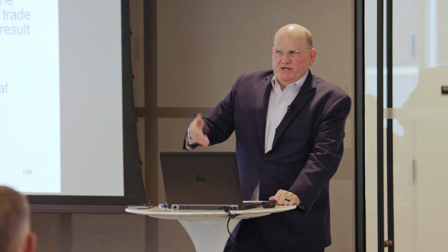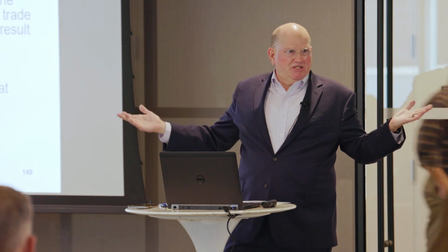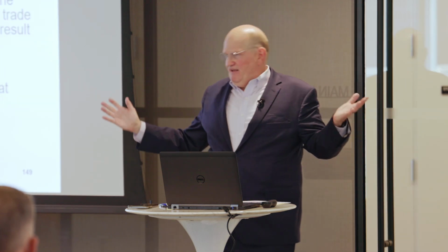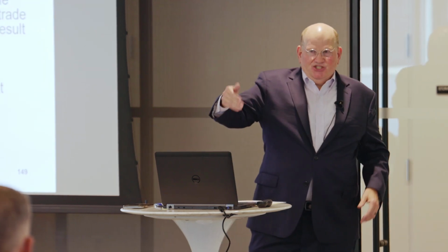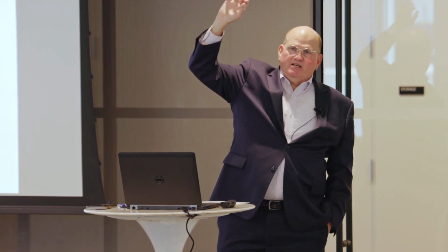And the owner's position was, hey, it's design build, you have to be liable. That's it. And the contractor came back and relied on differing site condition and failure to disclose. And you look at most design build contracts, they're gonna have standard differing site condition clauses. And in this case, the Board of Contract Appeals found their site inspection was reasonable. They could not get into the ceiling and see anything. The facility was operating, number one.